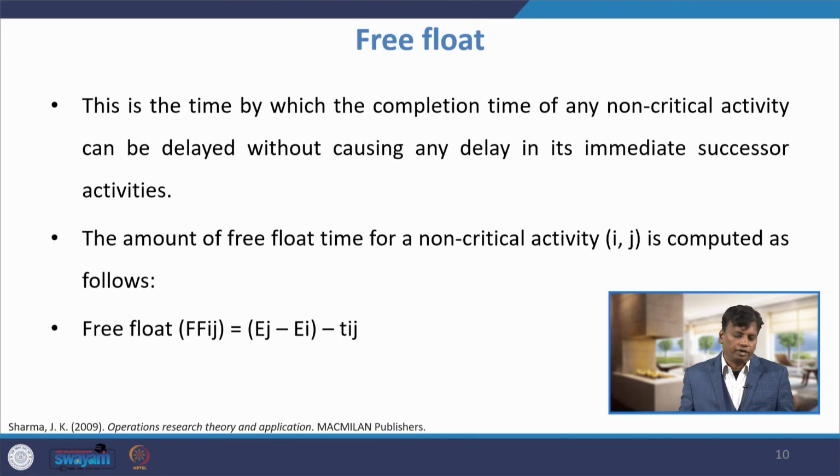The next one is free float, because in MS Project only these two floats are visible to us. Free float is the time by which the completion time of any non-critical activity can be delayed without causing any delay in its immediate successor activities.